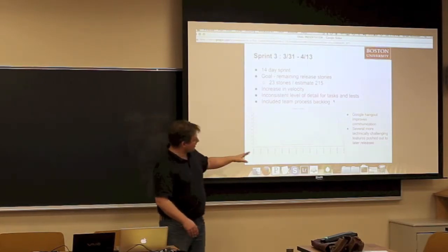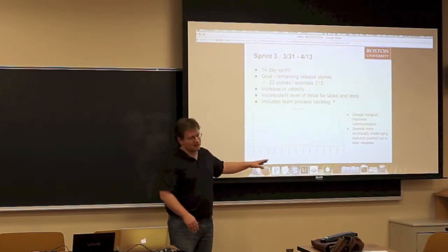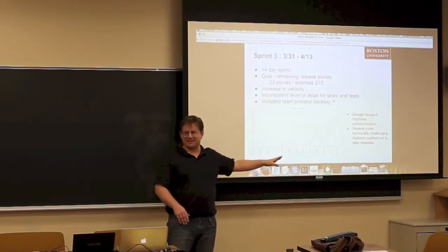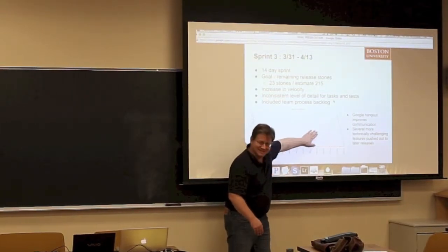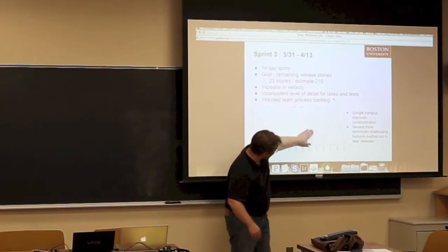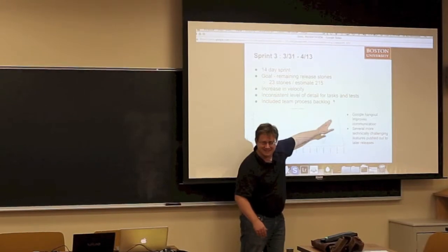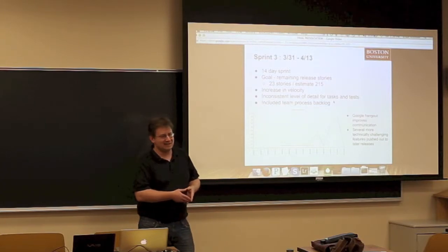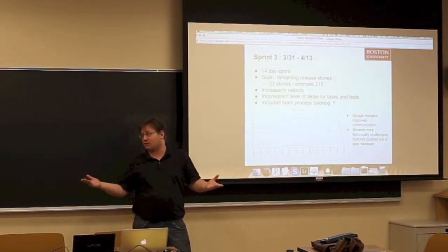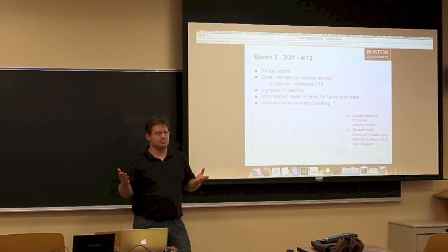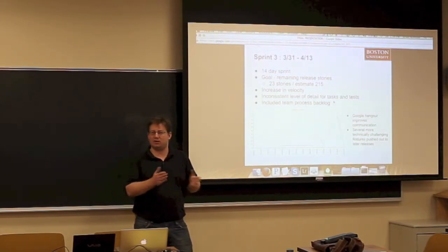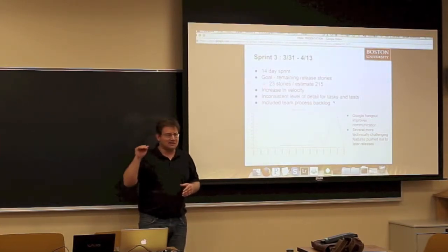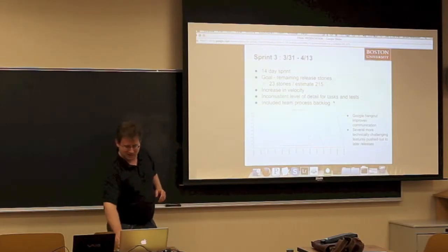Primarily the reason for the chart and the way this looks is that a lot of our tasks we didn't actually add to version 1 until late in our sprint. We added some initially, finished a bunch, and then we did a bunch more, and then we just completed everything in basically the last few days. With all of us being students working full-time, our time was definitely sporadic on when we could all dedicate time to do it. So that pretty much explains the not linear downward burn down charts.